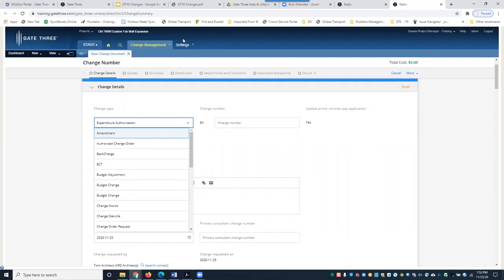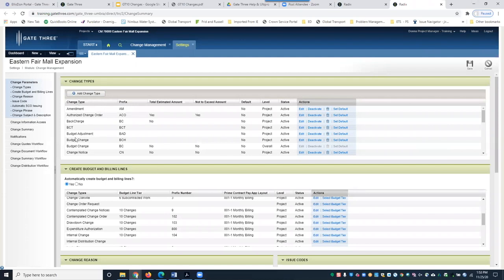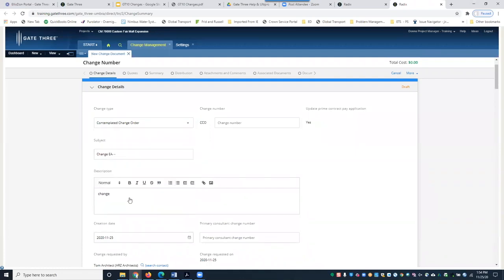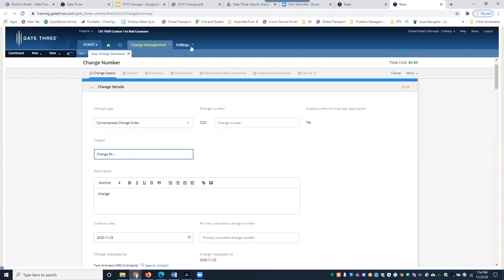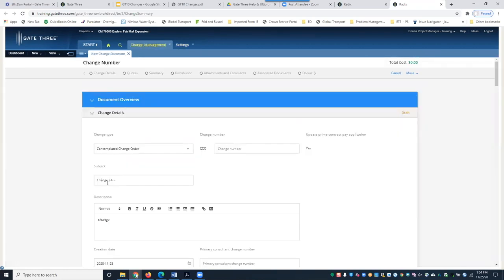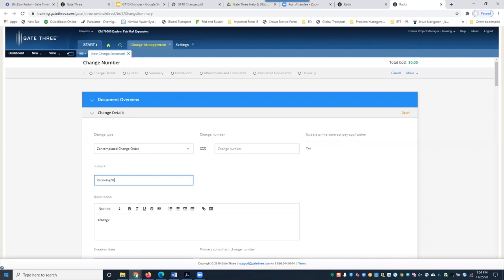Here you're going to select your change type, which is pulled in from the settings dropdown. Let's select Contemplated Change Order. The change number can be added manually, but Gate 3 will assign one automatically and sequentially, so I'll leave it blank. In the subject line, you'll see it pulls in 'Change' with a dash number based on the placeholder set in settings — you can easily override that.